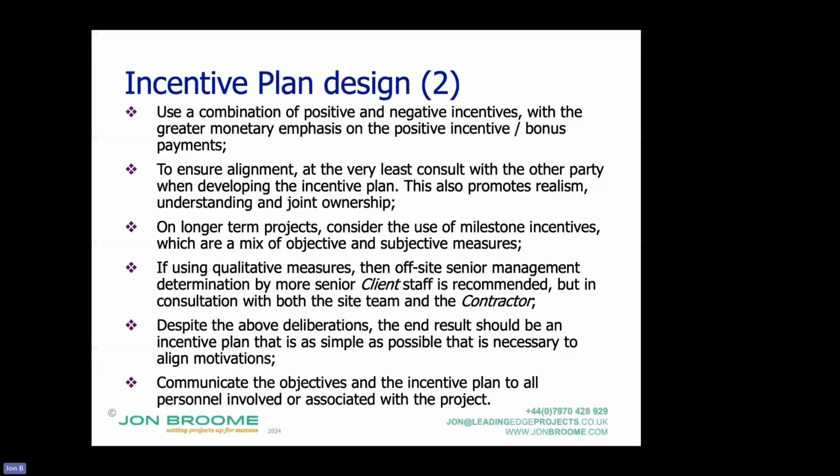And he said, when I was in Saudi Arabia, we did a trial. We let 5 projects with positive incentives only and 5 with negatives. In the ones with negative incentives, people would come into the meetings to defend their position and basically put the blame on the other party, to put the liability on the other party or escape their liability.